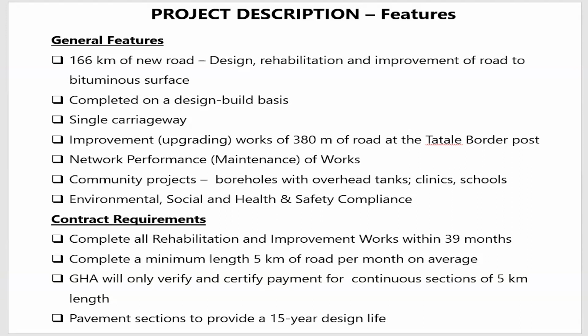He completes 5 kilometers and then he is paid a lump sum for it. So at this stage, as a road agency, we verify and only certify payment for continuous sessions of 5 kilometers. If he works anything less than 5 kilometers, we don't certify.